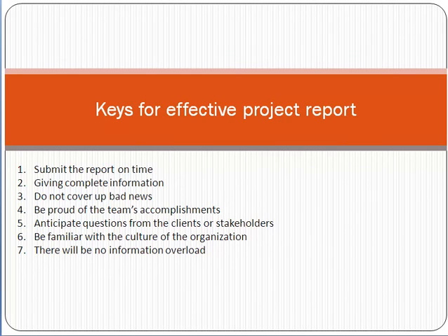Okay, then keys for effective project reporting. First of all, submit the report on time. If the report day is Monday, you have to submit the report every Monday. Give complete information. Half information should not be given; it should not be a case where you give only 50% of the information and hide the other 50%. Do not cover up the bad news. If there is any problem or issue, place it on the table. If the team has accomplished some major improvement or accomplishment, mention it properly.